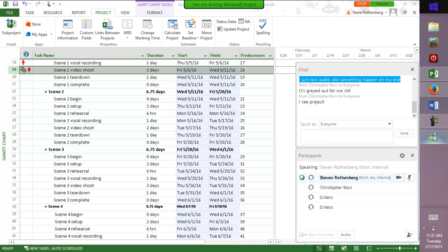So I think fixed unit, fixed duration, and fixed work pretty much indicates what the possibilities are. And then the formula: work equals duration times units, W equals D times U. Essentially, if you hold one of those variables fixed, then the other two have to vary inversely to the other. If one goes up, the other has to go down.